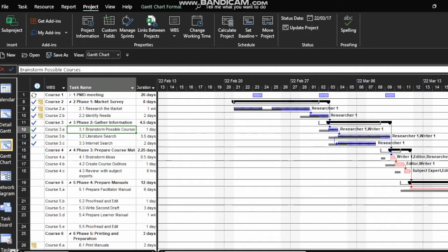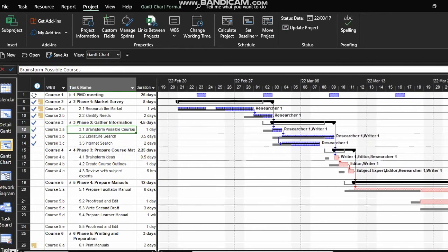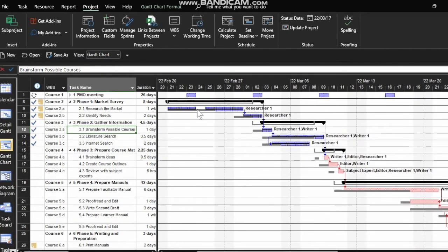We are looking at this meeting over here, and things have already gone askew with this project. Let's have a look at what's gone askew. A bit of a wildcat strike on that particular task shoved you out one day off your baseline. Notice the baseline is the gray bar below, and the blue bar above and around it is the actual, baseline versus actual.